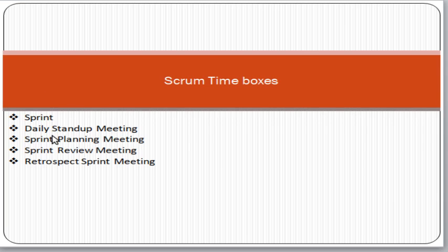Then another time box concept is the daily stand-up meeting. The daily stand-up meeting is a 15 minutes meeting. In 15 minutes, every core team member discusses what we did yesterday, what we are going to do today and tomorrow, and what issues we are facing. So it's a 15 minutes meeting.